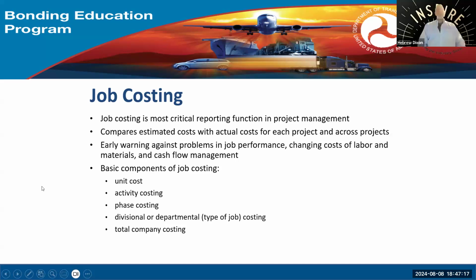When the last bullet talks about total company costing, that's the mentality as the business owner that we want you to really put your arms around, right? Because you want to make sure you're real clear that every week you talk about costs, not at the end of the month. You want to know that people turn their tickets in on time. You want to know that they report their labor hours on time. You want to know if someone didn't show up for the job.